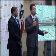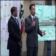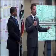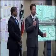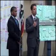But we take it one step further than that, and one of the things we have in our specifications is a monitoring program exactly for those kinds of effects. We're looking at two levels of displacement. On the one hand, you don't want to have, over the course of the construction, any displacement. On the other hand, you really don't want to have all that displacement occurring in 5 minutes. So we look at both. We look at almost an immediate change from our operations, and then we look at a long-term thing. Both of those, I think, are ways of looking out for that.